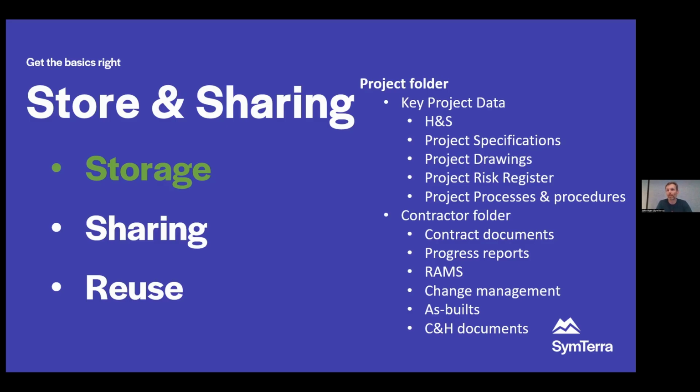The contractor folder is for them then to go off and manage and provide updates to yourself. You can put your contract documents in there so they know exactly what their deliverables are. Progress reports, site diaries, weekly, monthly reporting, inspections, audits, all can go in there. Your RAMs, which we always need to go off and see as either the client organization or principal contractors. Very importantly, your change management, which then drives into your as-builts, and finally, commissioning and handover documentation, which can be then rolled up into the final handover to the authorized person who's going to be managing the building. And then this, in turn, as Dave mentioned earlier on, can be shared then with the local residents to better understand what's their risk profile of their building and what's going on with it.